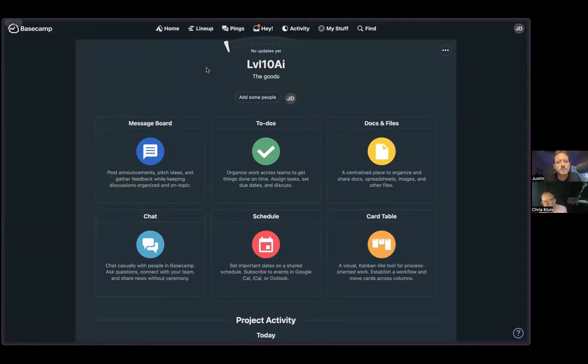So one of the things they talked about with that is for projects, people have this concept that, hey, it's 80% done, so we're good. But they have this concept, no, it's 80% done, and now we're stuck. They talked about how you know when you've crossed the hill. So they called it a hill chart on purpose. We know when we've crossed the hill and we're on our way down. We could be 80% done and just barely crossing the hill. And so they specifically don't use percentages, and that's the thing I like about them. They are very opinionated when they talk about this stuff.